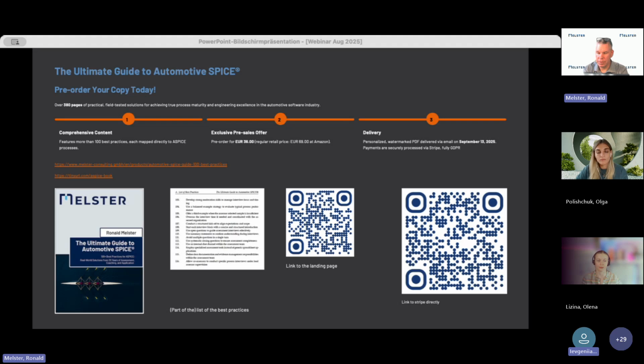Yes. Someone mentioned it in the chat: the meeting minutes mentioning this version of the architecture was presented to the team. That's a real communication evidence. But just putting the architecture into the SharePoint is not sufficient for some critical documents, and the architecture is one of them.